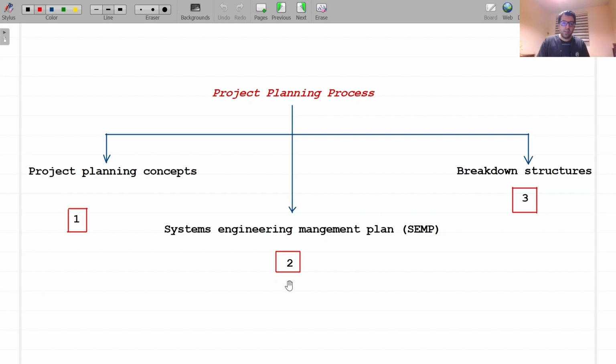Organization of how systems engineering interfaces with the other parts of the organization, responsibilities and authority of the key engineering roles, clear system boundaries and scope of the system, key technical objectives, assumptions, and constraints linked to them, infrastructure support and resource management, that is, facilities, tools, IT, personnel, technical schedule, including key milestones, decision gates, and associated criteria.